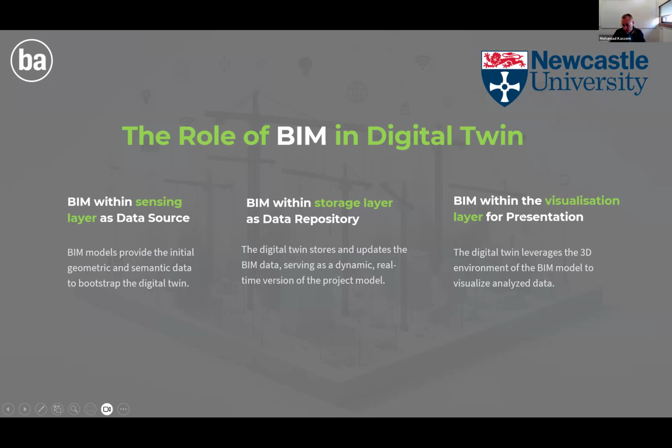The problem of this conventional practice is that it's super time consuming, it's manual, and most importantly, it's highly subjective, relevant to the individual experience of each project manager. And they consider risks in isolation, without considering the interrelations and effects that these risks have on each other.